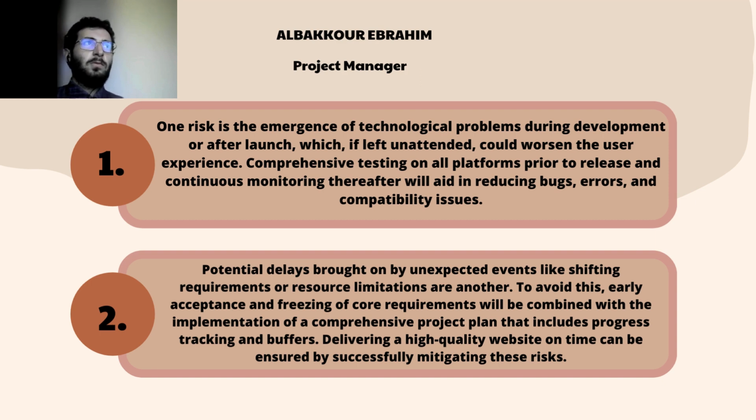And the second one is potential delays brought on by unexpected events like shifting requirements or resource limitation. And to avoid shifting requirements and resources, we should early accept and freeze the core requirements, which are the crucial and the critical requirements which cannot be changed or get shifted during the development.